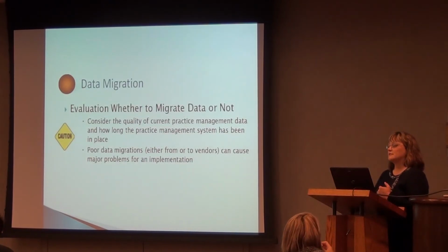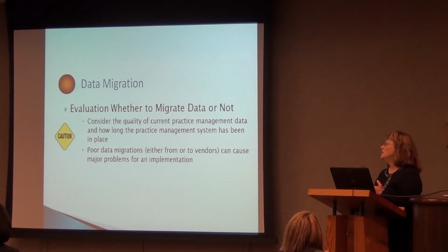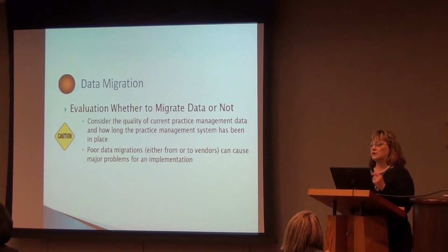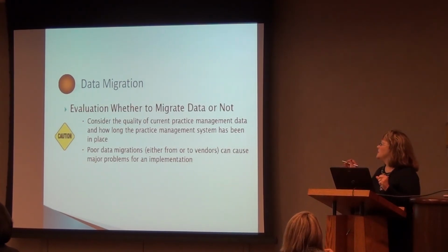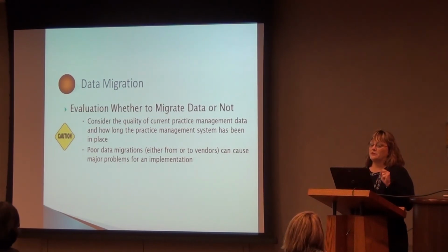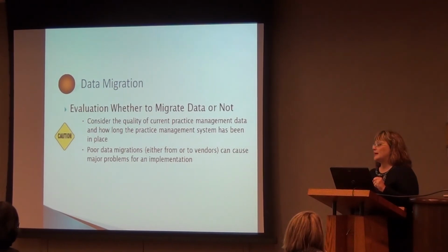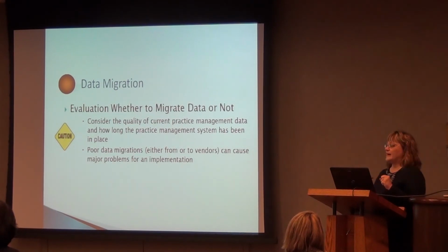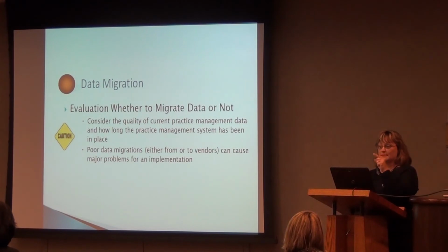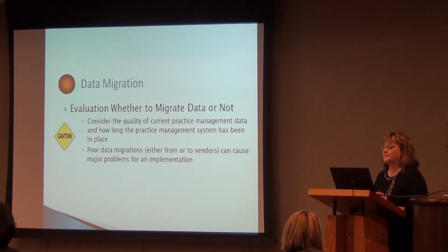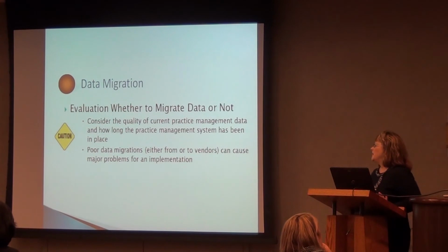Data migration. So this is your practice management system. What I caution you is look at your practice management system, determine how clean the data is, how old the data is before you transfer it into the system. There's actually practices I recommend don't transfer the data, it's not worth it. The other caution, which I didn't have on here, is your current vendor for practice management will charge you an extraction fee to get that data out of there. There's only one system I've seen where they actually don't charge for an extraction, and that's LITEC.